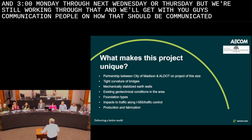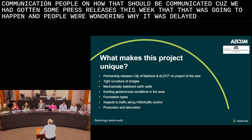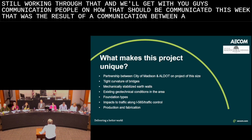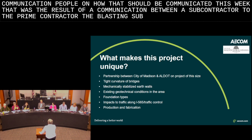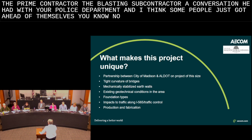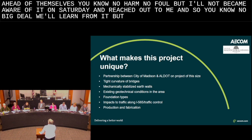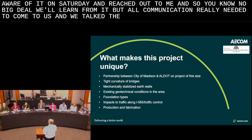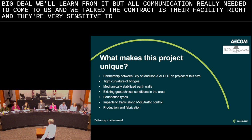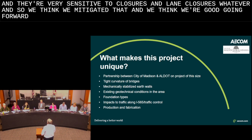Yeah, I had some questions because we had gotten some press releases this week that something was going to happen, and people were wondering why it was delayed. That was the result of a communication between a subcontractor to the prime contractor, the blasting subcontractor, and a conversation he had with your police department, and I think some people just got ahead of themselves. No harm, no foul, but ALDOT became aware of it on Saturday and reached out to me, so no big deal. We'll learn from it, but all communication really needs to come to us, and we talked to the contractor about that as well. It needs to come through us to you guys and to ALDOT, because it's their facility, right? And they're very sensitive to lane closures. So we think we mitigated that, and we think we're good going forward. Okay, thank you. Yes, ma'am.